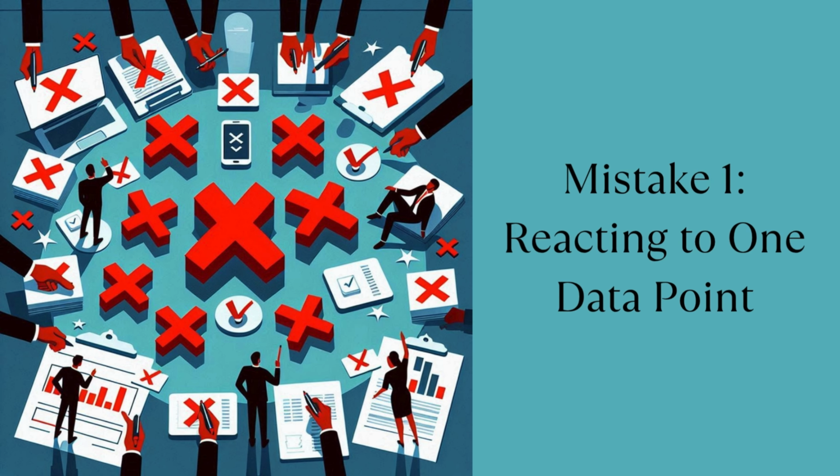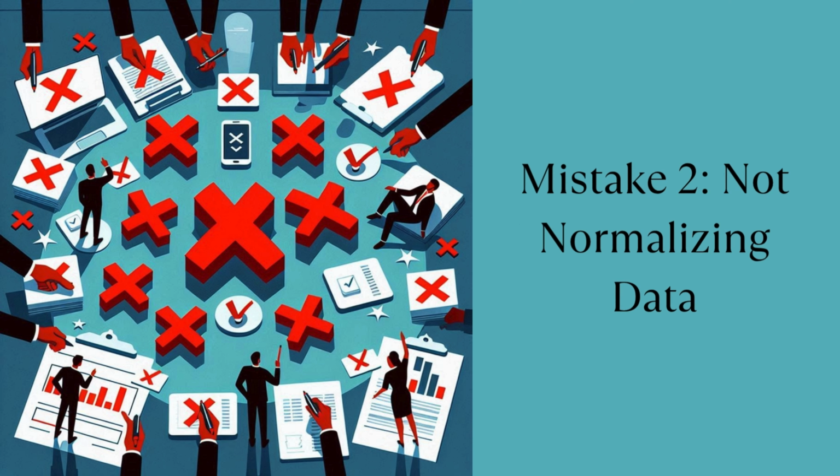Common mistakes in trend analysis and how to avoid them. Mistake 1. Reacting to one data point. Trends need time. Don't panic from one bad CPI, watch the pattern. Mistake 2. Not normalizing data. Make sure data is consistent. Daily versus weekly? Apples to oranges.